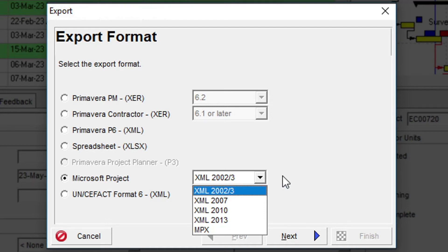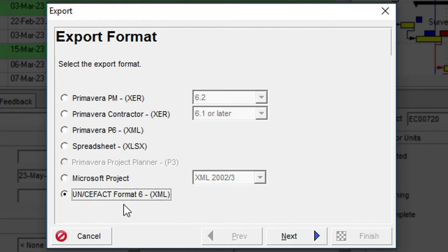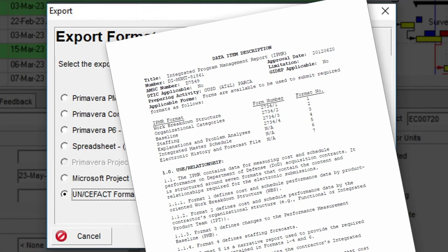The last option is UNCFACT Format 6 XML, which was added to Primavera versions after 2012 as part of the U.S. government's new IPMR Data Item Description for Earned Value Reporting.